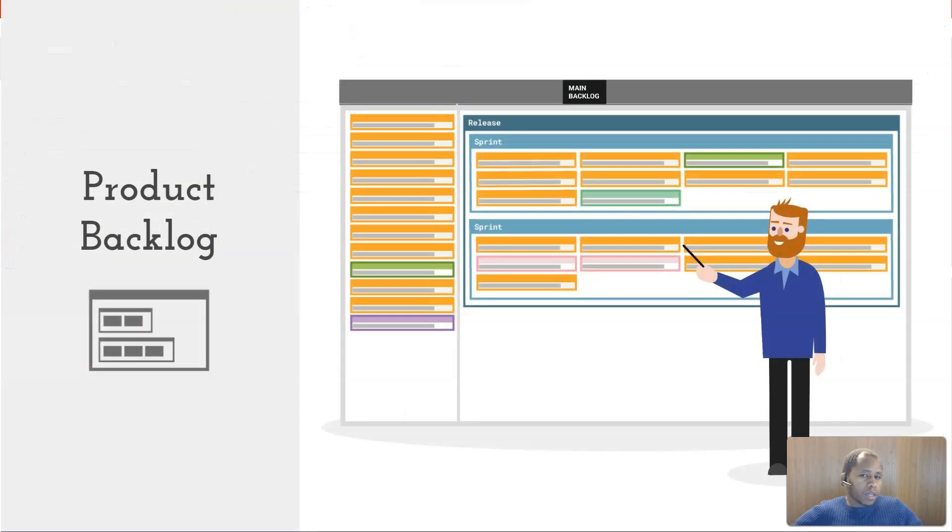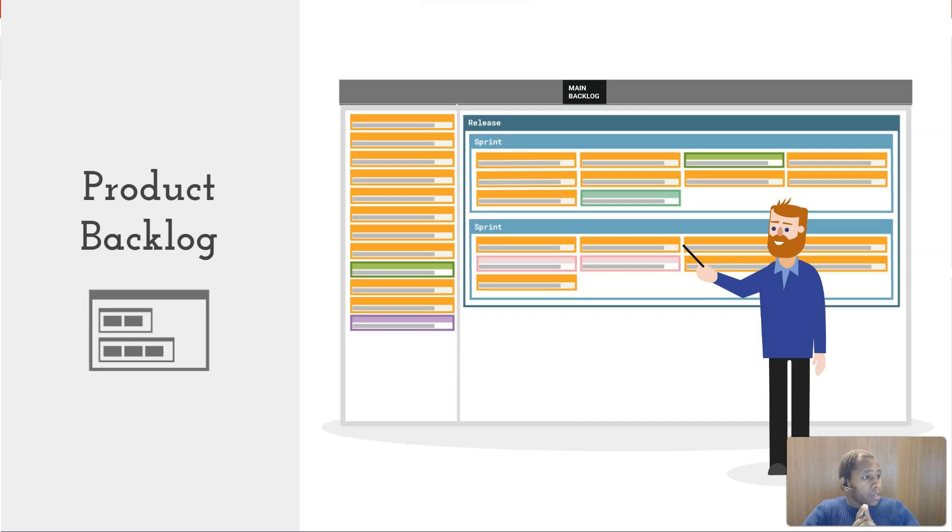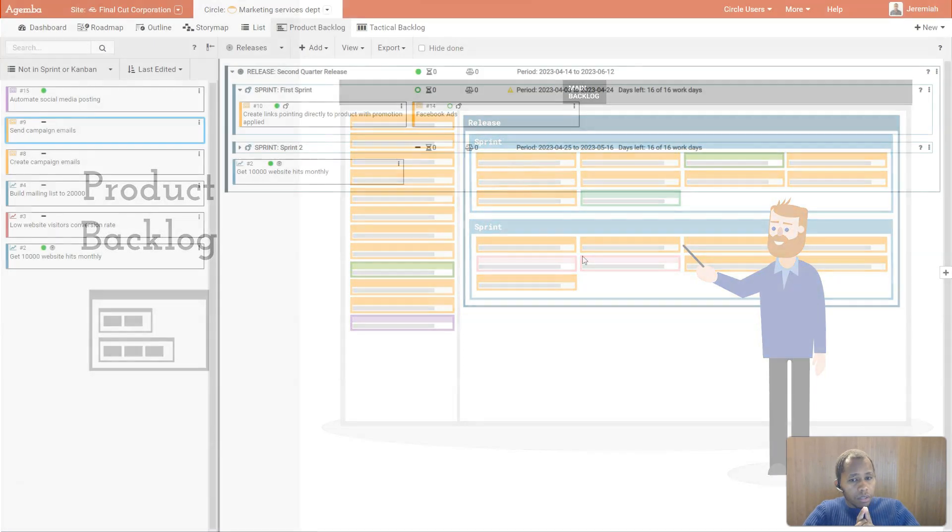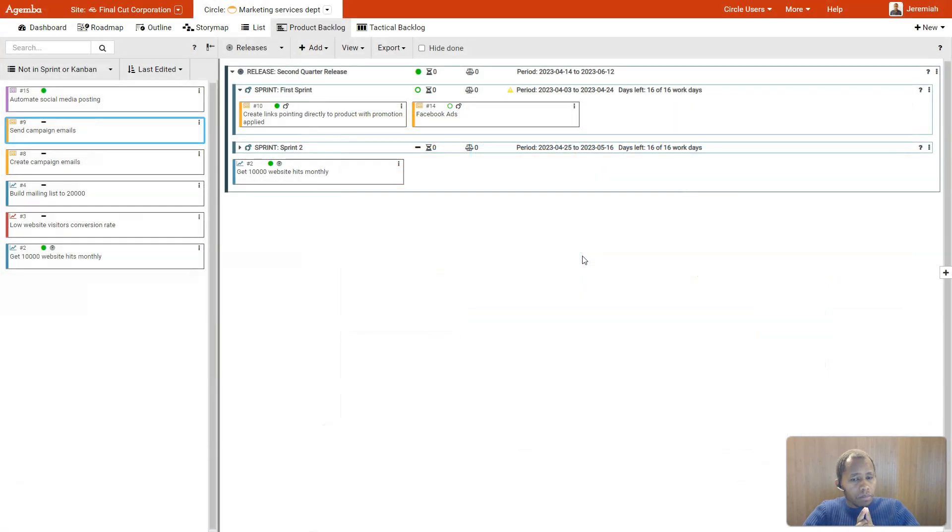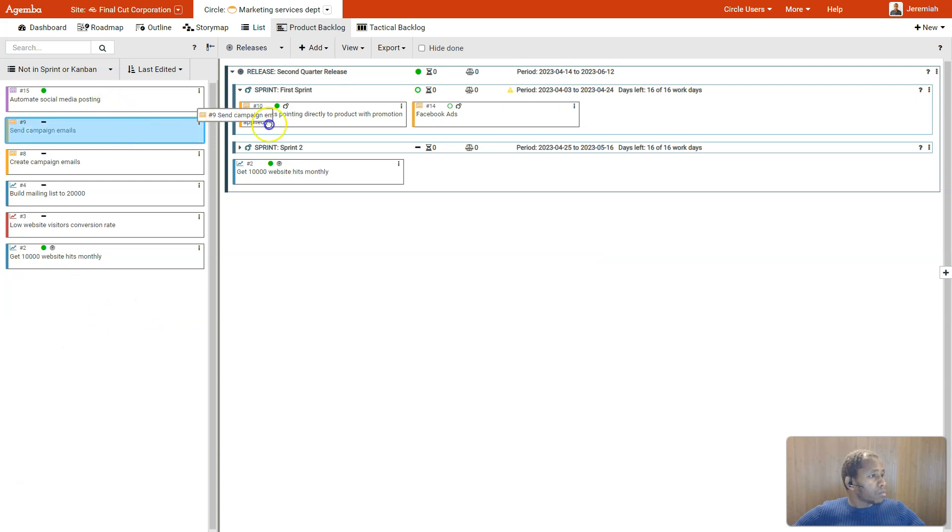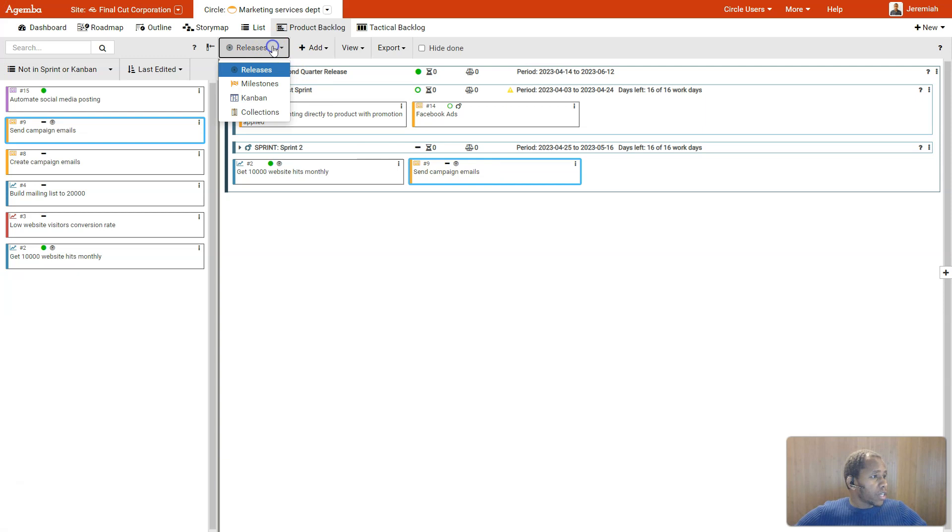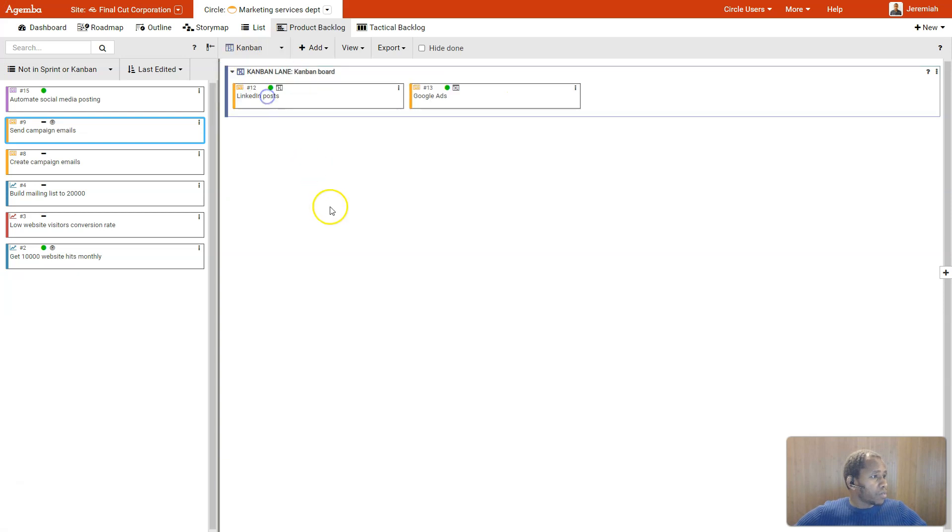Agamba is most of all a tool that helps you prioritize your work. Much of this planning is done in the product backlog. Here all the stories you have created will be listed to the left side, where you can plan them into sprints or releases that are to the right, and even into Kanban lanes.